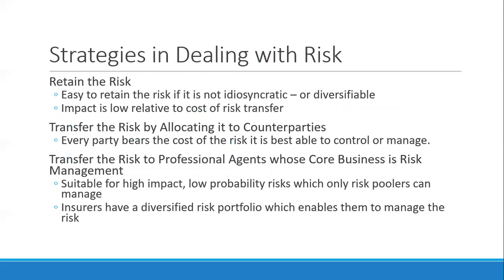There are different strategies in dealing with risk. The company may retain the risks it faces, or transfer them by allocating risks to counterparties — through EPC contracts, O&M agreements, supply agreements, or offtake agreements — allowing you to allocate risks to those counterparties best able to control or manage them. Lastly, you can transfer risk to professional agents such as insurers.